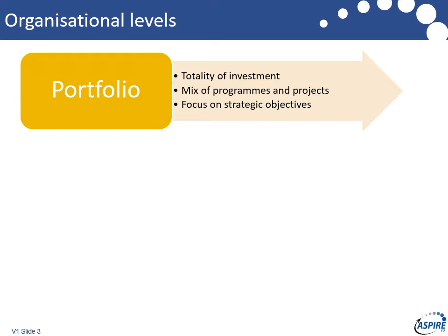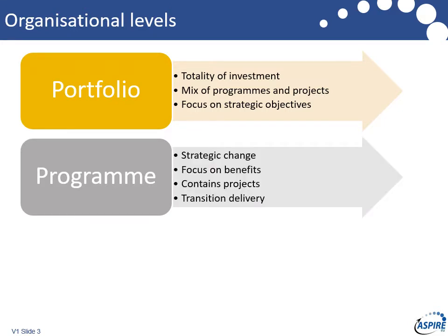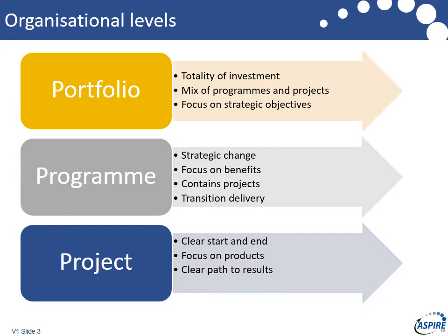So the directing happens at the portfolio level. We've then got the program layer, which is really about delivering some big stuff and substantial change. And normally with a program layer, we're starting to talk about changing business processes quite significantly, or if you're looking at the transport sector, for example, looking at the way modes of transport are working, there's normally a much bigger change going on rather than just building the projects, although that's where the money tends to be spent. And then we've got the project layer, which sits below it and is about building stuff. So we've got those three tiers.